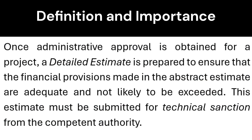Once administrative approval is obtained for a project, a detailed estimate is prepared to ensure that the financial provisions made in the abstract estimate are adequate and not likely to be exceeded. This estimate must be submitted for technical sanction from the competent authority.